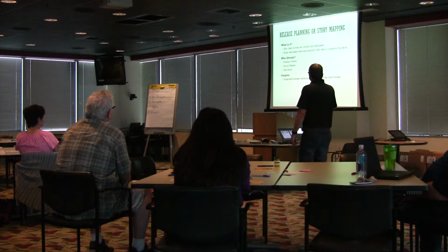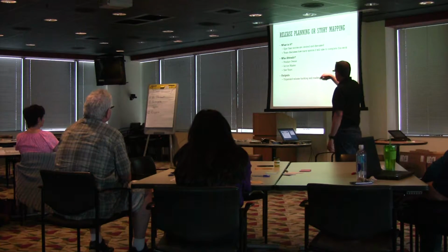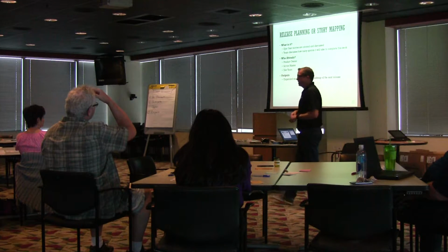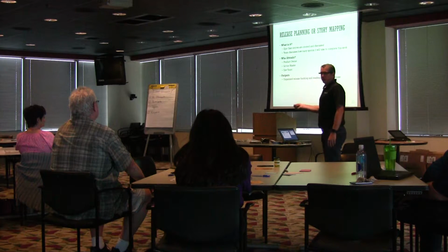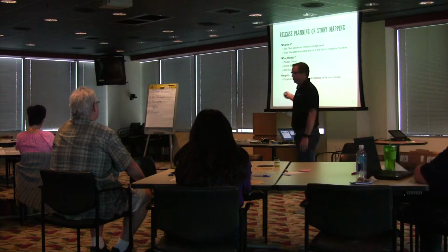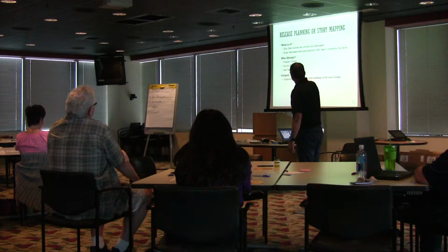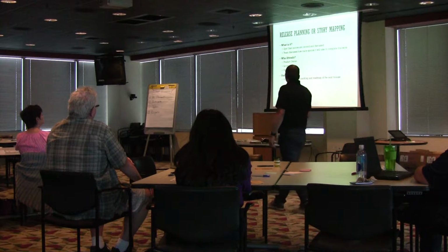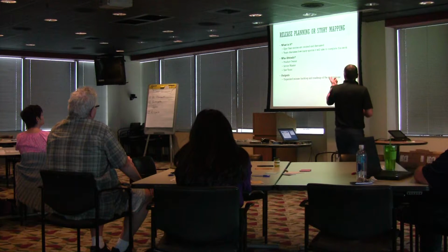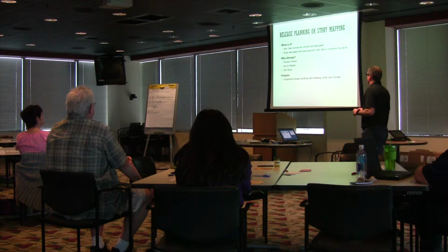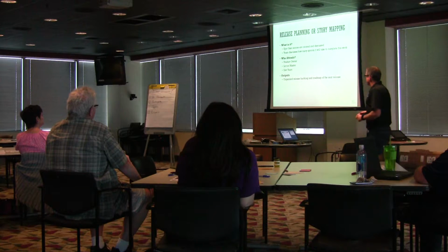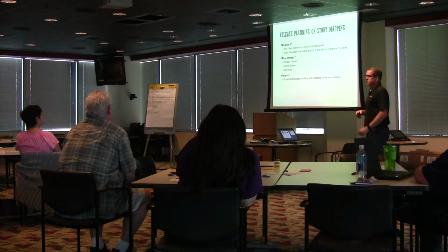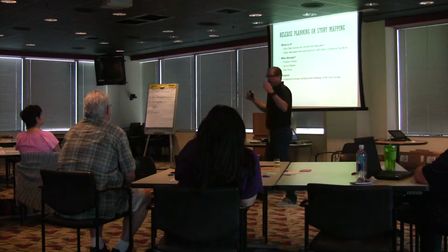So delving into these, release planning, which wasn't mentioned on the activities, is not an official event necessarily, but a good activity to do. Going to the concept that in Agile we don't plan. Well, here are some of the things that we should do: release planning or story mapping. Epic user stories are created and discussed in these activities. The team discusses how many sprints it might take to complete the story. The product owner, scrum master, and dev team attend, and the output is an organized release plan and/or a roadmap for the next release. So let me talk about those specifically.